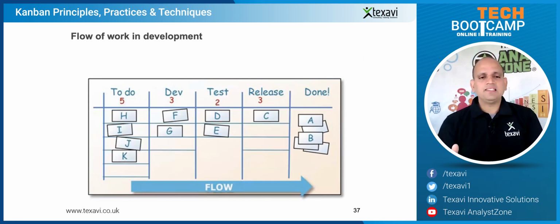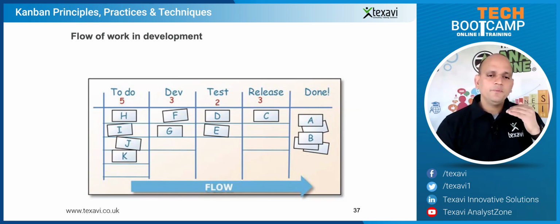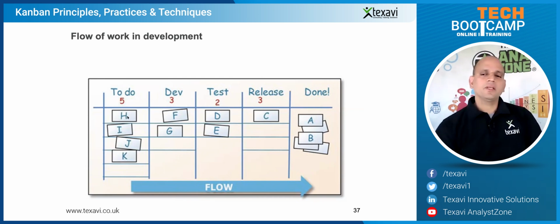And then how you really do it is, as we discussed, it could be with respect to the backlog. The to-do could be the product backlog. And then the dev could be the sprint backlog. The first item in the sprint backlog is the dev. Then you can have test, release, done, or deployed on live. So it's totally up to you. The team would decide whether they want 5 columns or 50 columns, right? And then within each of these, you can decide whether it's done by Sarah, Dave, or somebody else. You can use color post-its. All yellow ones are all Dave's, all pink ones are all Sarah's, and all the blue ones are Paul's, for example. So you can have that kind of flexibility and simplicity built into the way you're tracking the work.